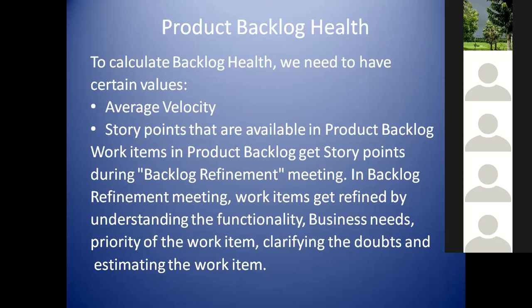But what is the disadvantage if you don't have any refined items? There may be a time when you cannot spend time on refinement, not only in December, which happens only once a year, right? There are many other situations, like half of your team taking planned leave during a particular week. How will you plan your refinement? You cannot have the refinement, but next week the next sprint will be starting. How will you manage your work? So you should always have some reserve in your product backlog. That's why we say this is backlog health.